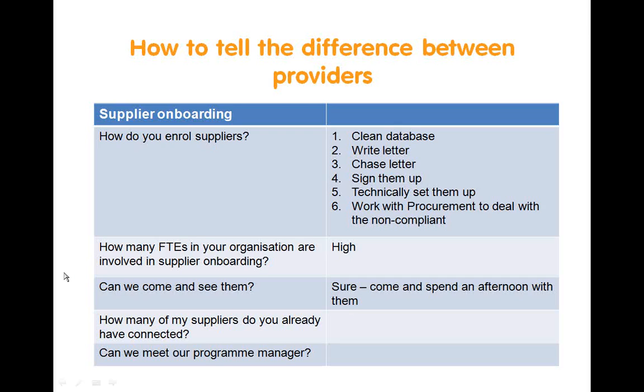The question I would also ask is how many full-time equivalents in your organization are involved in supplier onboarding. So when talking to the service providers, this is a question I would ask them. You want their response to be high. I reiterate the point that e-invoicing is about onboarding suppliers, and it will work when you have enough suppliers on board. So having people in the organization and within your service provider doing this and doing it well is absolutely key.